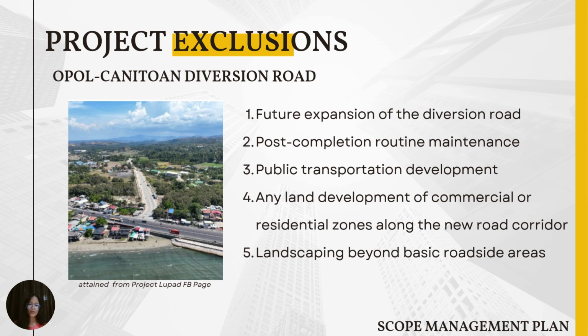So, project exclusions for the construction of OPOL-CANITOAN Diversion Road is future expansion and routine maintenance post completion. So, upon completing the diversion road, it is excluded the routine maintenance as well as the public transportation development, any land development of commercial or residential zones along the new road, and the landscaping beyond basic roadside areas. So it is excluded from the project and will be part of a separate project. So it is not part of our